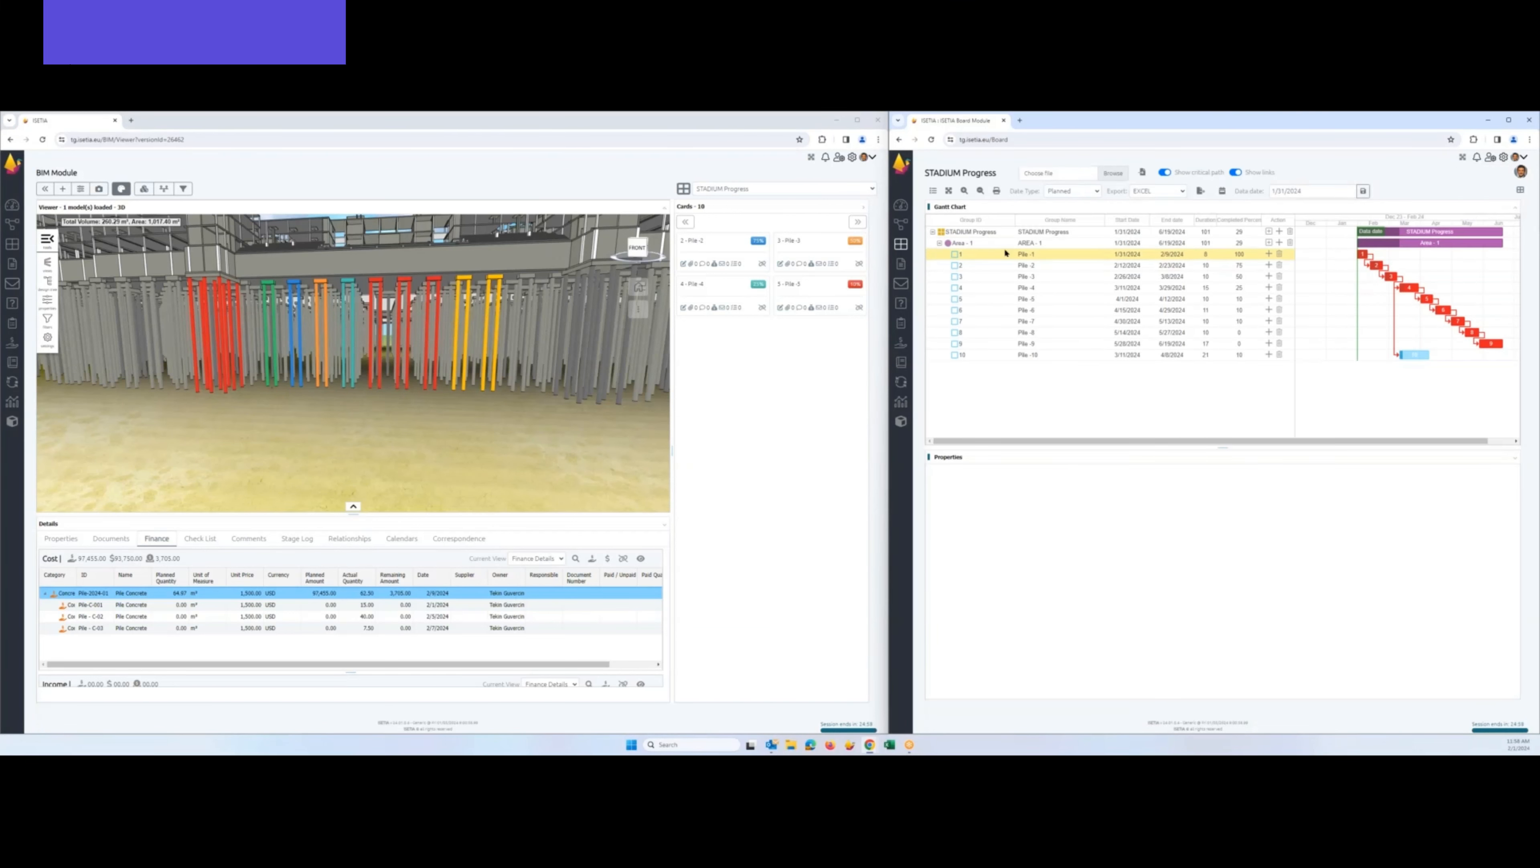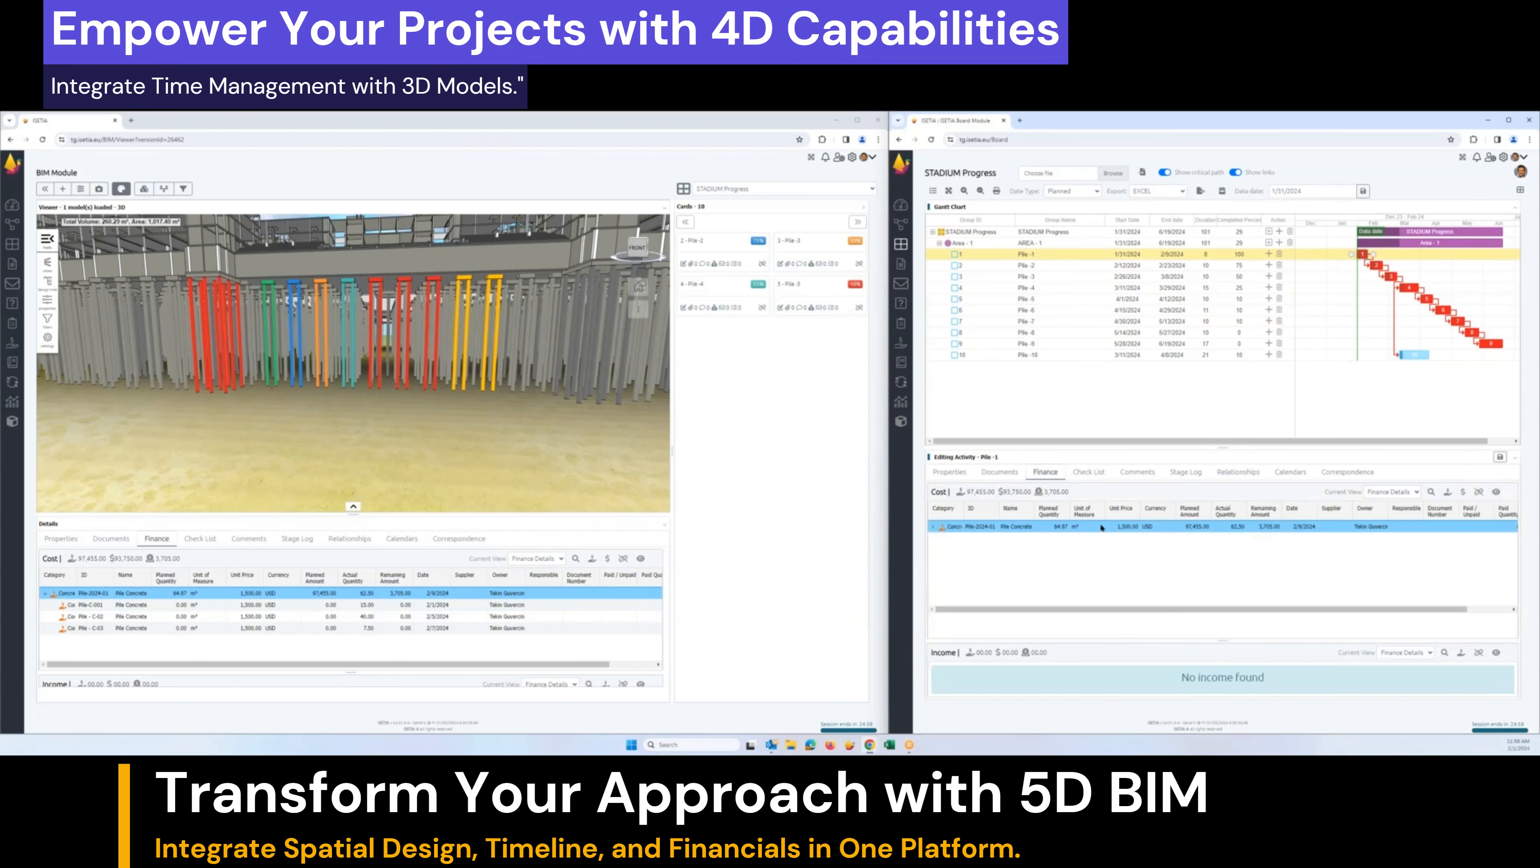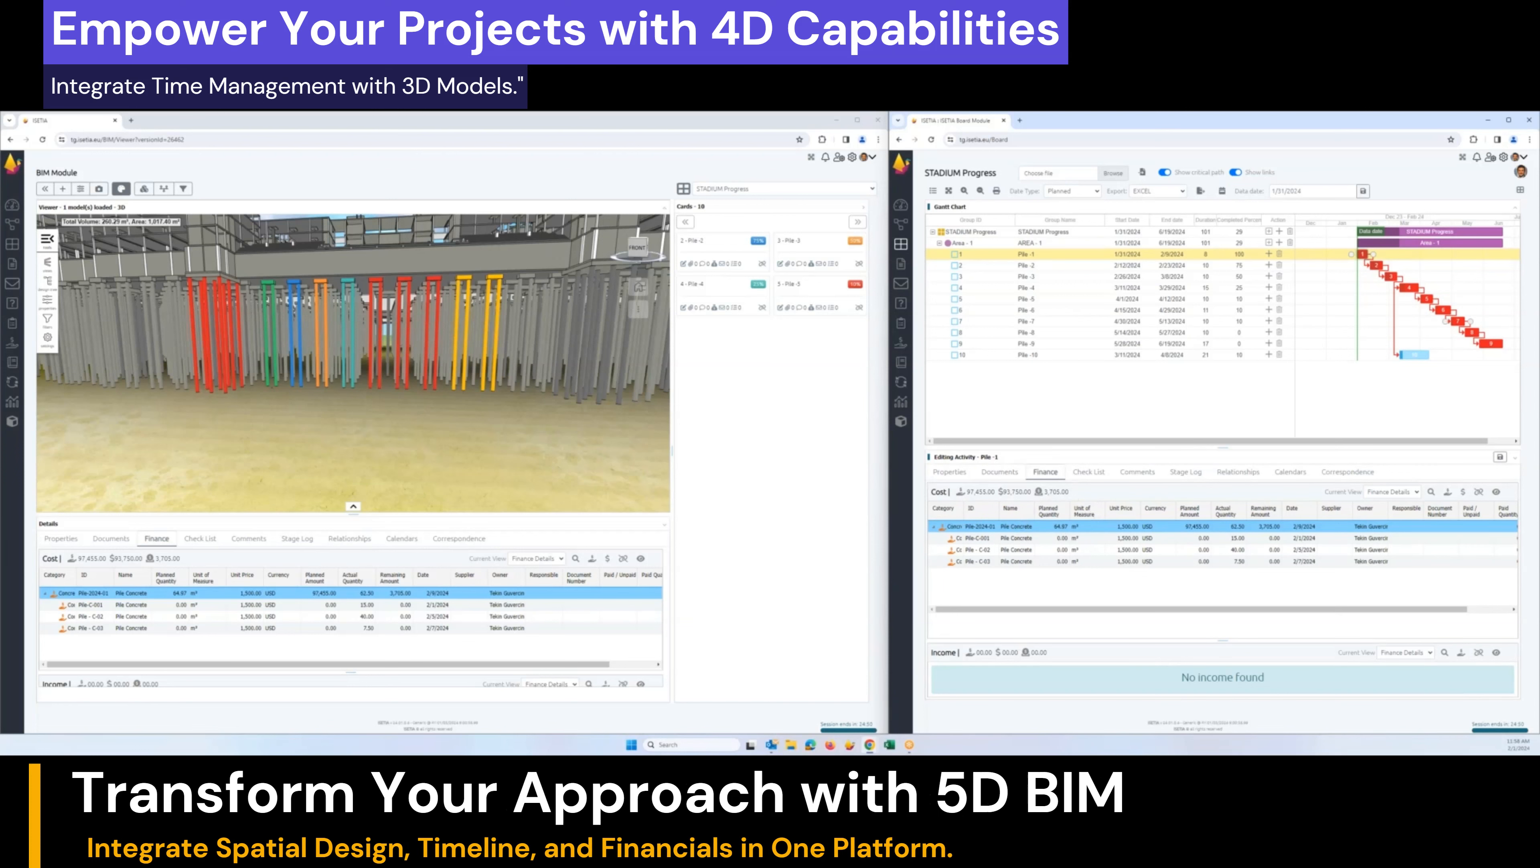The system shows the project schedule, and when you select an activity, we are able to see the financial information with the quantity and unit price. This is the 5D capability that we have: you have a unit price, you have a quantity, and you have a total plan, actual, and remaining.